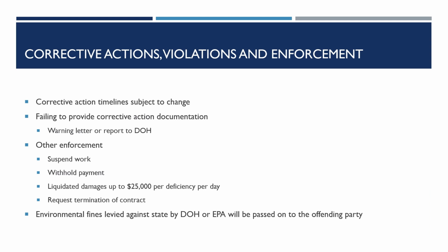Corrective actions. Timelines for corrective actions are currently listed in DOTA's Construction Site Runoff Program and are subject to change to match updates to state and federal environmental rules and regulations. Violations and enforcement. For state projects, if the contractor fails to provide corrective action documentation within the designated timeline, AIR EE may escalate enforcement actions, including but not limited to issuing a warning letter or reporting the violations to DOH. DOTA may also